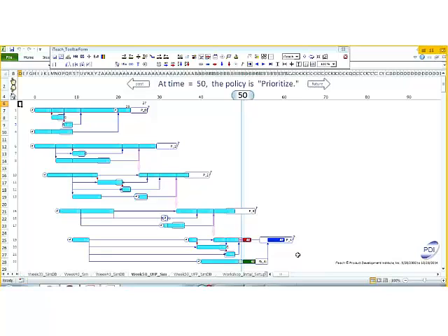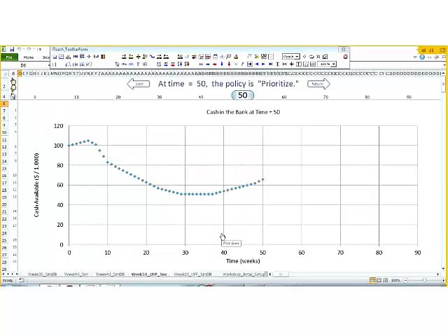There's actually a fair amount of buffer incursion, and that's because I played in an urgent field problem that used the red resource to show that we can still account for unplanned work and still make our commitments. Let's look at how we're doing financially. So we went into that dive, got down to about $45,000 in the bank, and now we're starting to grow the revenue. So it seems like this prioritization policy is really paying off.